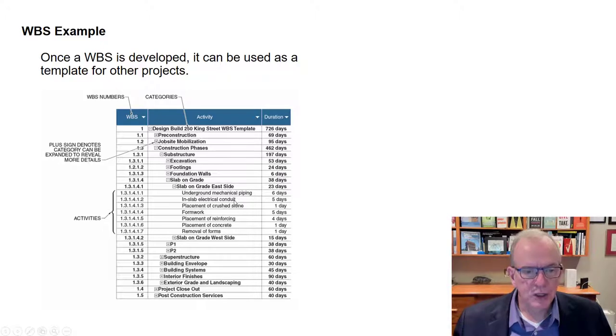Now at this stage, you could assign individual costs to the individual activities, and they would sum up over here. So at differing levels, you could monitor the work. You could see how are we doing overall on the project when you've updated it compared to your baseline.